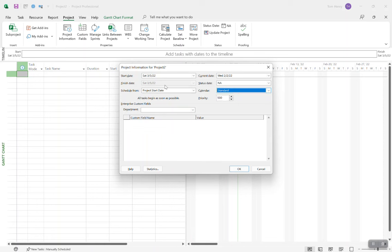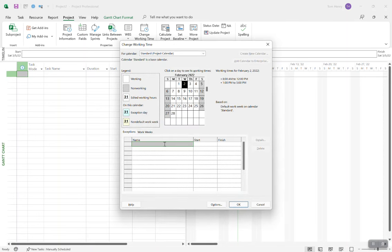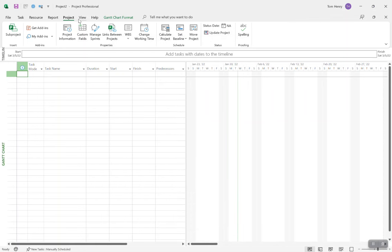You can create your own calendars or go with the standard eight to five Monday through Friday. There are no vacation days or holidays by default, so you definitely want to set up at least public holidays for your calendar. That can all be done in the Change Working Time area — you can come in here and put in holidays for the standard calendar. Start date, calendar — check, check. Good stuff.